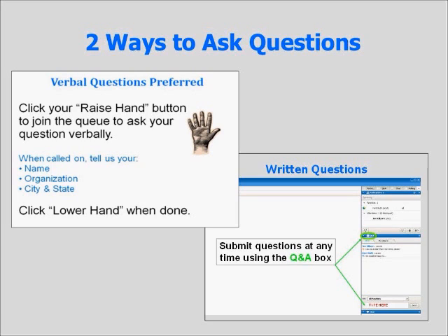But that's my point. It's included within each line item. So literally, like built in the contract, not a separate line, right? And sometimes builders who deal with public sector contracts do provide more data than they should. So I think one thing is kind of the cost reasonableness and whether they got quotes for this and whether this price is within, or if you've got someone else outside, an underwriter type, looking at prices and comparing this to what they think the rehab should cost.